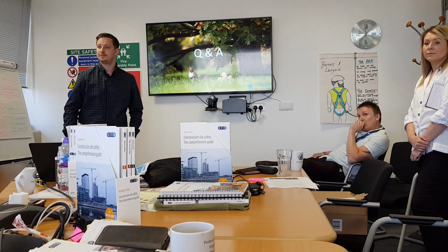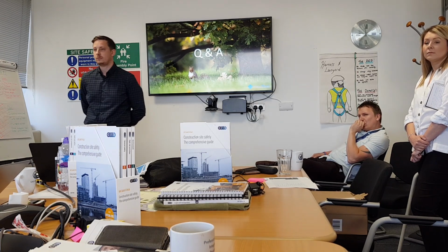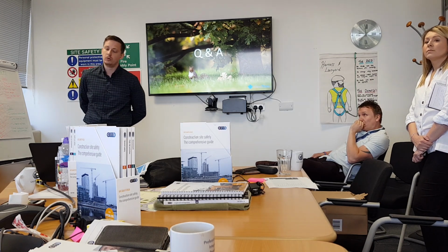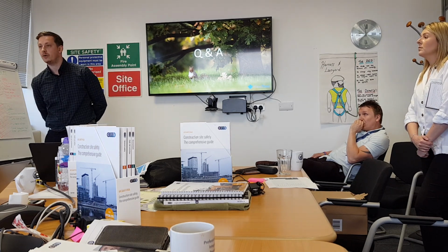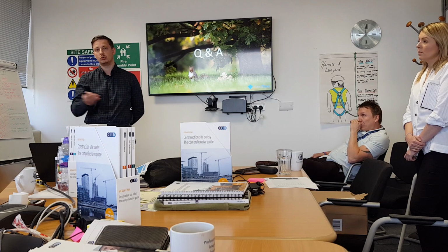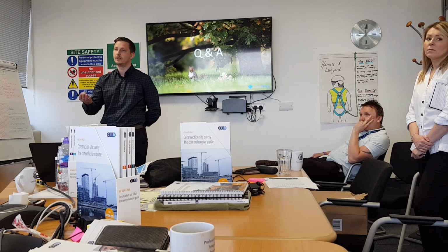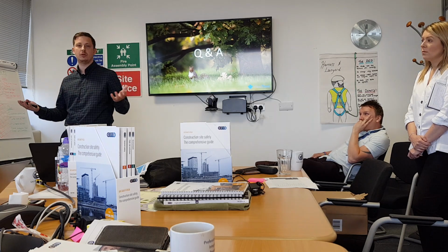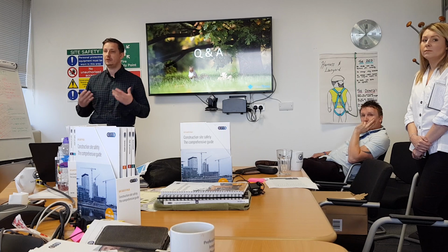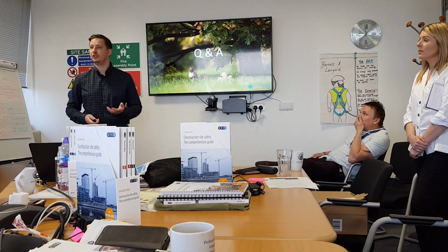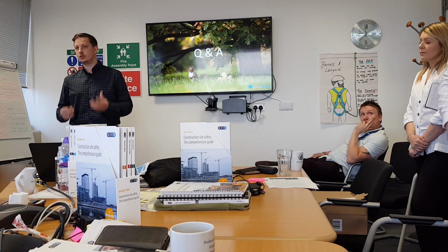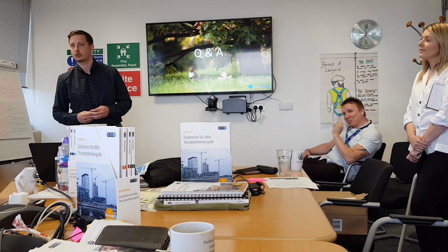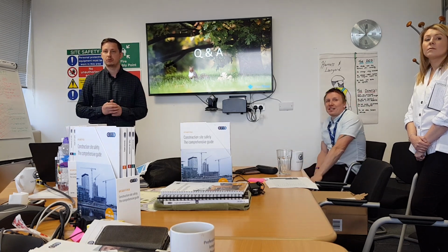With the school being so close, how have you arranged your site times with the school drop-off and pick-up times to avoid traffic? Well, I think I touched on it, the site times are 8 till 5:30, so the guys are going to be on site between 7:30 and 8 o'clock. They're leaving site roughly 5, 5:30. General school time starts at 9, finishing 3, 3:30. So we shouldn't have any effect on the local school. The local school has 160 kids, I think, if I remember right, and we've been working with Mr. Gall. There's not a lot of main traffic on the actual school road.